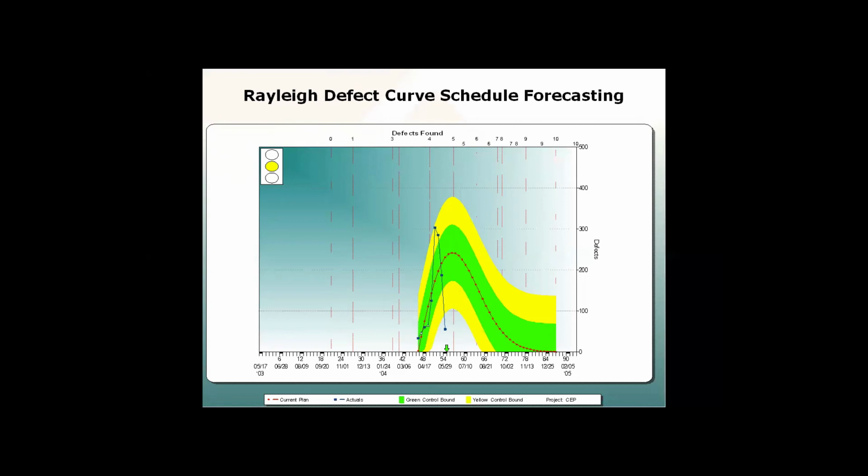Plus or minus maybe 30% or higher. And when the model locked on to the fact that they were riding this curve, even though it was noisy and spiky, we did a rolling smoothing, we were able to look ahead and see when they would be at the point where the curve was riding down to that tail where 90% of the bugs will have already been found and fixed. And what would that forecast be?